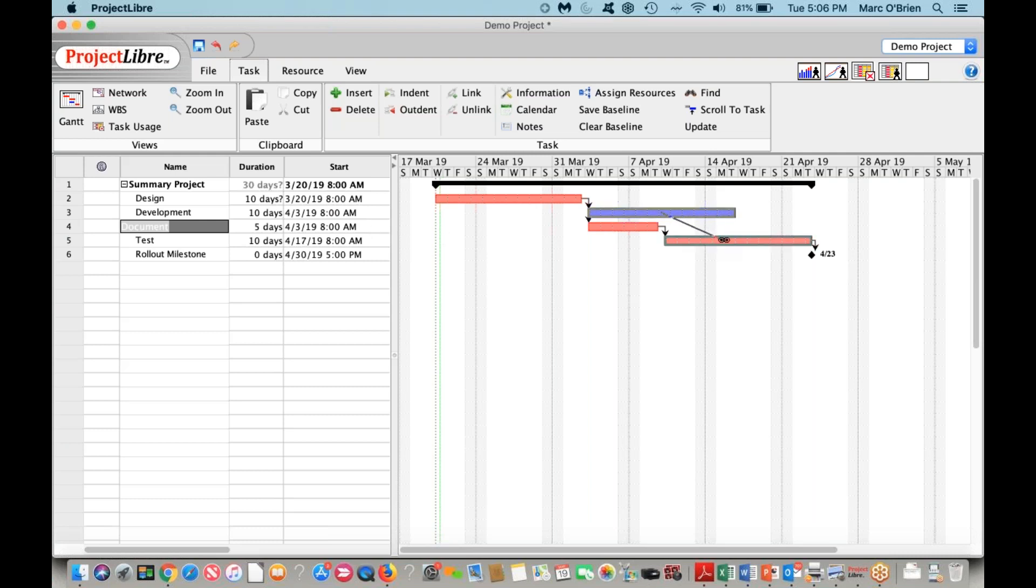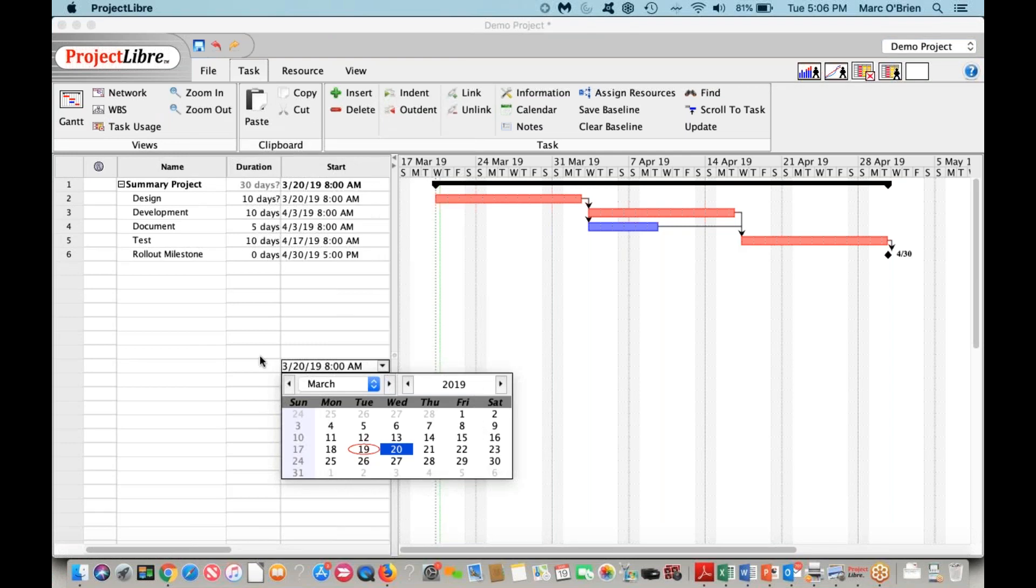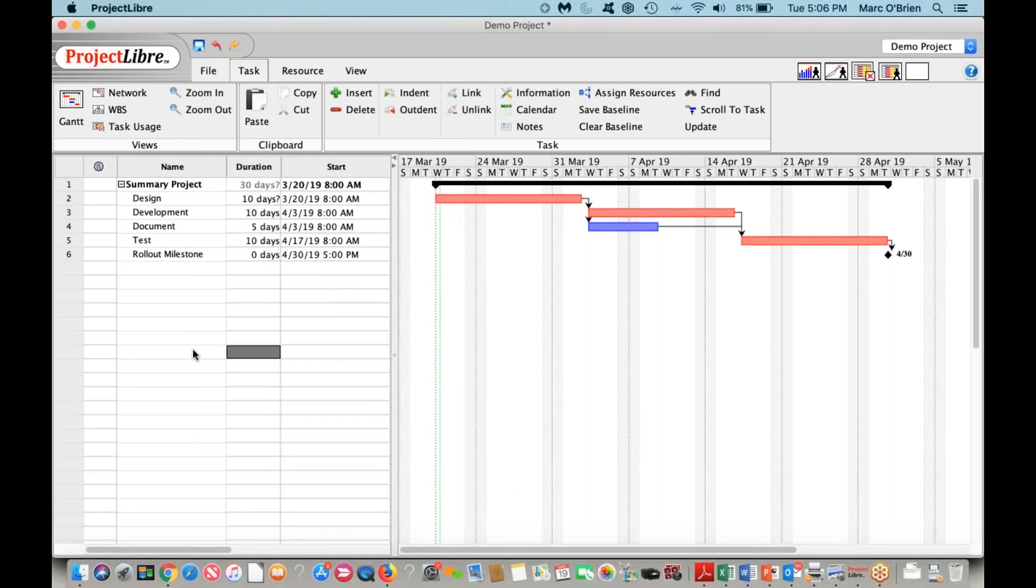If I do the same thing and link them, you can see the critical path schedule has now been established. The longest path through this project is the critical path, that's in red. Non-critical tasks, which is documentation, are in blue.